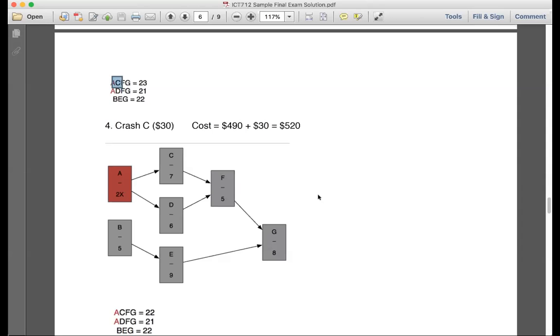My friend, we are basically showing you from a calculations perspective how it works day by day. If you're going to crash 2 days together, you'll have to calculate how much you're saving per day either way. So here we are doing it the simple way where you see visually how much it's going to cost you for each day of crashing, because in those exercises you need to compare your cost.